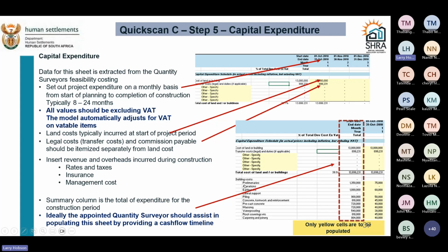And then when it comes to doing your detailed building costs, ideally at that stage you'll have your QS estimates, put them in as much detail as you're able to. There's provision for detail that serves for most companies, but there is a section at the bottom of each of the subsections here where you can enter one-off line items for yourselves that pertain to your entity.